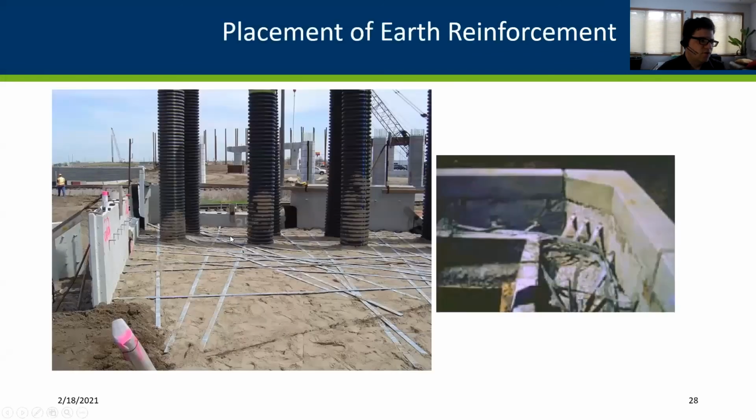So who reviews that? Well, you should probably review that, and the inspector should review that. And part of the reason for that is some of these areas are going to be messy. There's going to be utilities behind this wall, and they need to have details for getting around those utilities or those obstructions to make sure we get a nice mat of reinforcing and not a messy rat's nest of reinforcing. So just those things that aren't addressed in the shop drawings need to be caught. And the more eyes looking at those, the better off we are with that product.